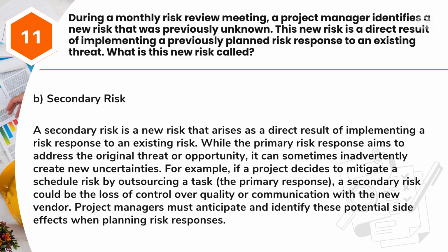For example, if a project decides to mitigate a schedule risk by outsourcing a task, the primary response, a secondary risk could be the loss of control over quality or communication with the new vendor. Project managers must anticipate and identify these potential side effects when planning risk responses.